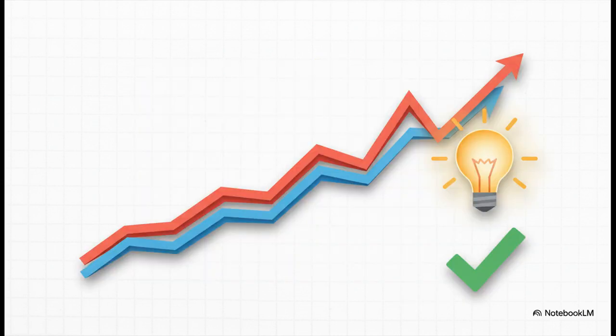Now, let's look at that exact same scenario with a burnup chart. The team's completed work line is still climbing steadily, proving they're making progress, but you see the total scope line make a clear, sharp jump. There is zero confusion. The target grew and everyone can see it plain as day.